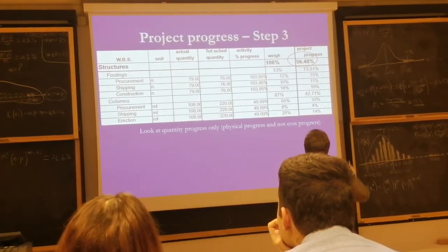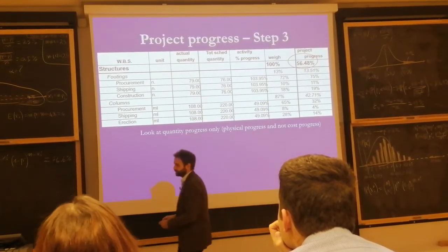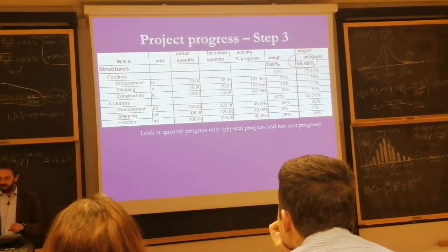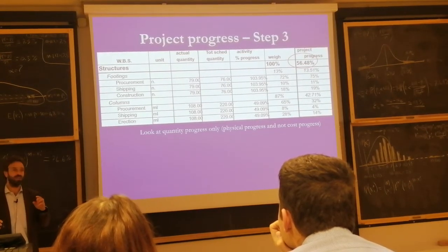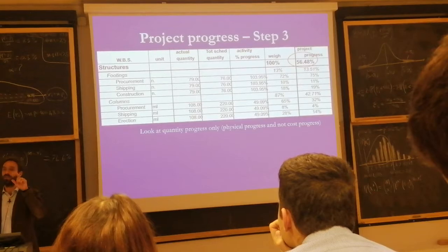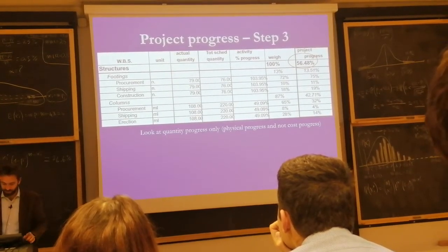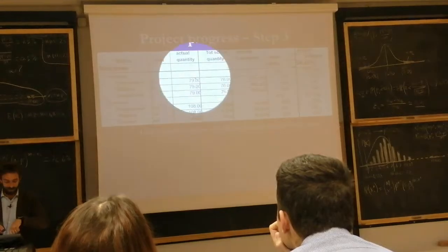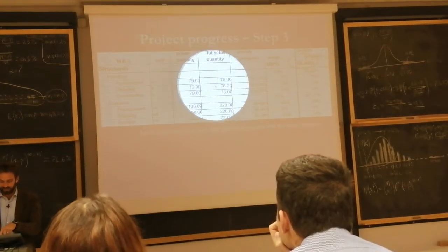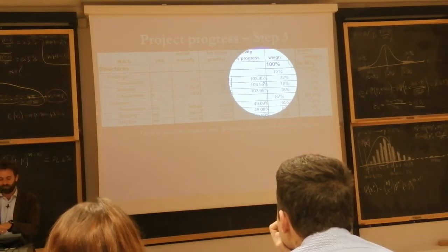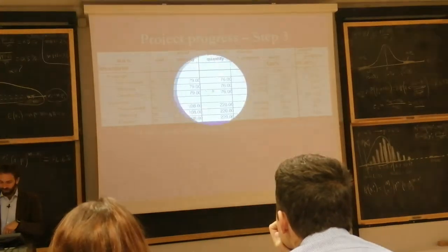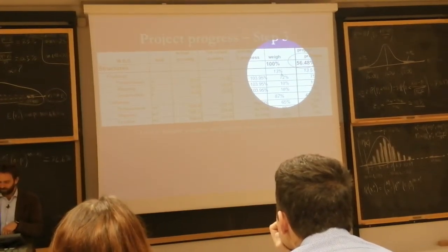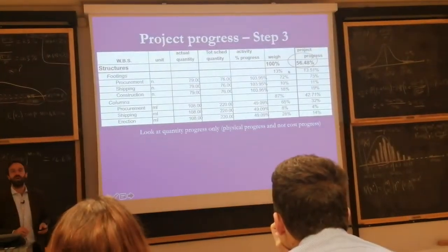Right, so if we measure progress now, it's 79. Did you get how I computed a full physical project progress? You need explanations? It's the weighted summation. So just to let you understand, because I just see that someone wants me to clarify. 79 divided by 76 is 103.95%. I multiplied this times 72 times 13 plus this times this times this plus this times this times this, then I go to weighted average in full, 56.